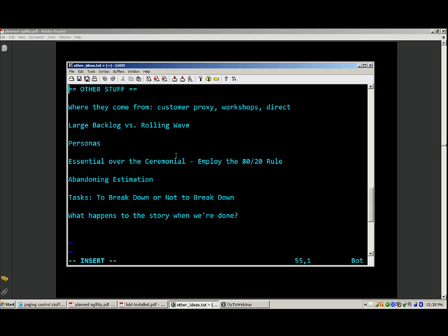I've done it a couple of ways. Typically what we end up doing is we'll take 5-10 minutes. We'll start with an expression of the vision of the product and the main value propositions and why we're doing this. And then everyone takes 5-10 minutes and writes down features, and I wouldn't be super worried about getting them in a story format. Just write down the title of the feature.